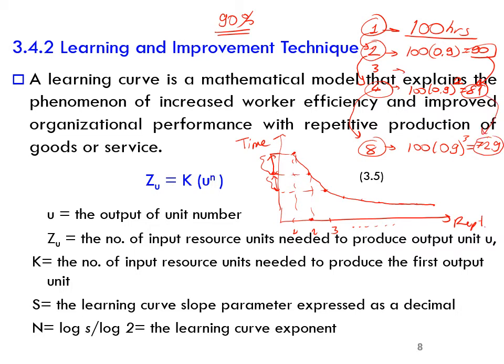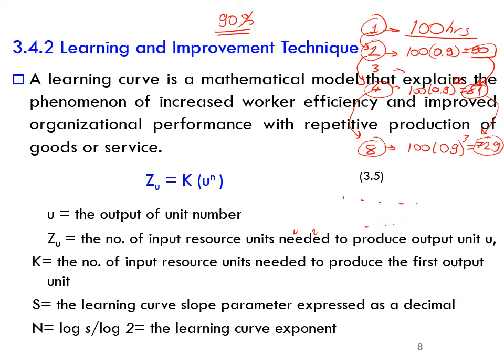So when we double the production, when we double the repetition, the necessary time reduces by a constant percentage. This is the idea behind the learning curve. We can use this equation over here to calculate the necessary time for producing the outputs. Here, as you can see, this Z_U is the number of input resource units needed